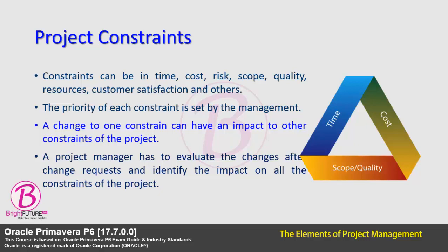A project inevitably goes through many changes due to the competing demands we were talking about earlier. Each change request goes through a change request process. A project manager has to evaluate these changes and identify the impact on all the constraints of the project through the integrated change control process.